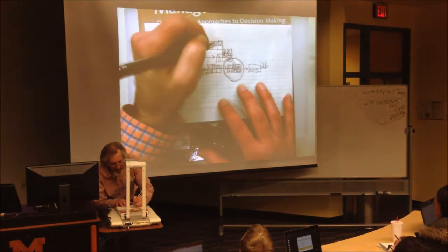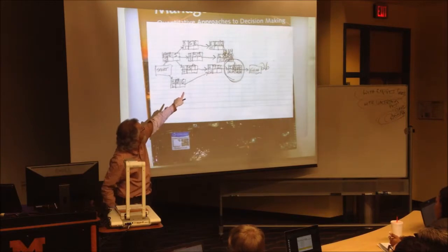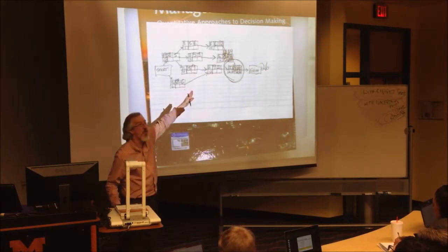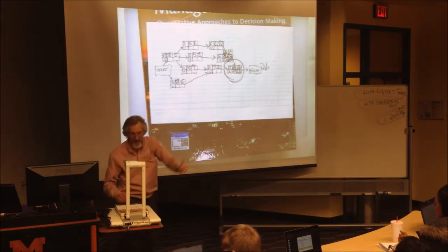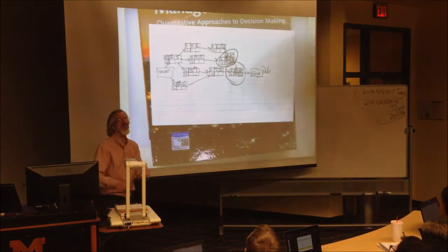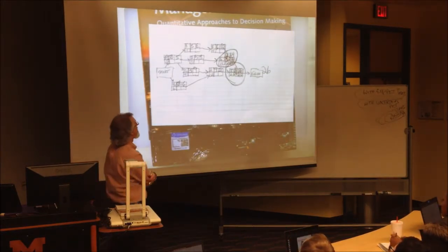24 minus 14 is 10. Look at the earliest start, day 10. Look at the latest start, day 10. Finishes, 24, 24. What did I just discover? Another critical activity. I'm circling that, I'm highlighting it. I'm looking up phone numbers right now to figure out who these are.